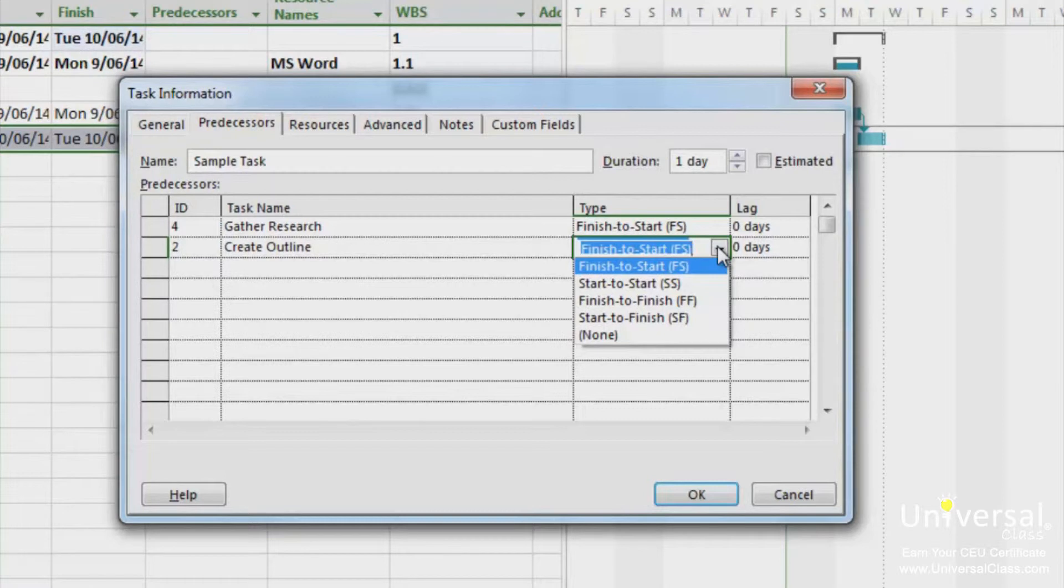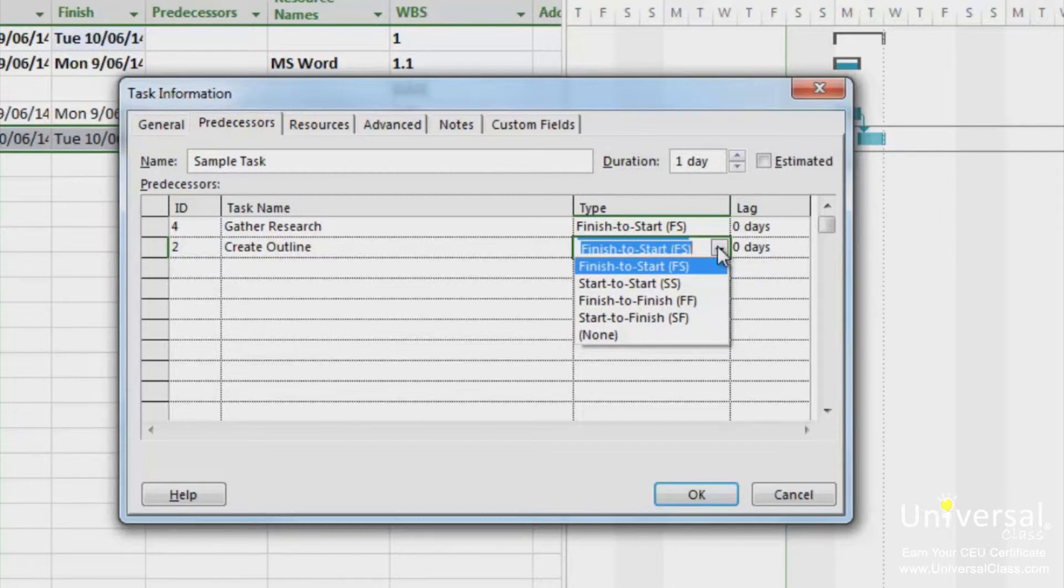Start to finish. This relationship means that the start of one task determines the finish of another. Start to start. The start of one task also determines the start of another task. Finish to finish. The finish of one task determines the finish of another. Click OK.